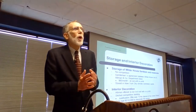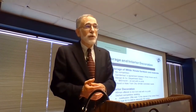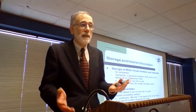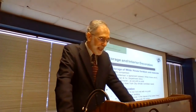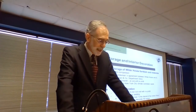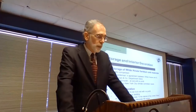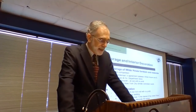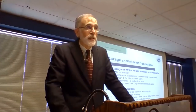So what do you do with all of the furniture and all of the materials that come out of the White House? Somebody has to manage this. So they selected a firm to manage it without any competitive bid process. It was a gentleman's agreement between the White House and a firm called B. Altman. They agreed to do it for $85 a month with no profit. And they stored these materials in New York City in climate-controlled facilities.